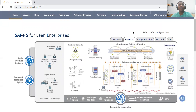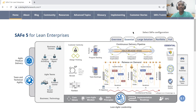As a first step, we will be identifying one Agile Release Train where we'll be working on one common solution or one common implementation. Once the first successful Agile Release Train is launched, implemented, and we gather feedback, that's when the next release trains will be prepared for launching and taken for execution towards transformation at the organizational level. From that perspective, when we talk about one single Agile Release Train as the first step, we'll be focusing on the essential configuration.